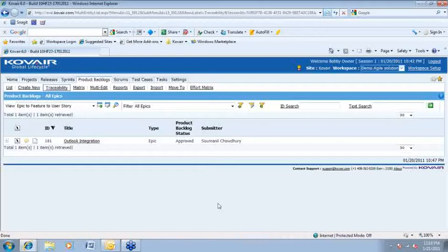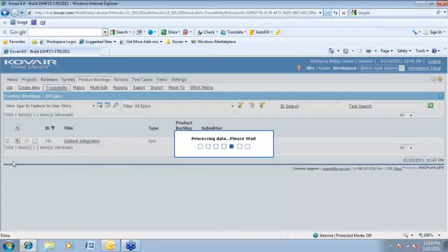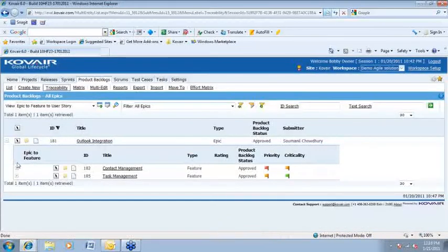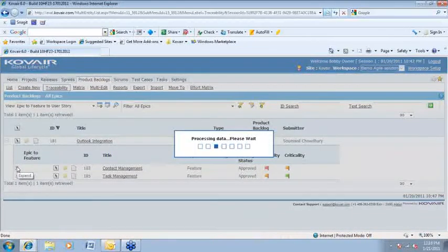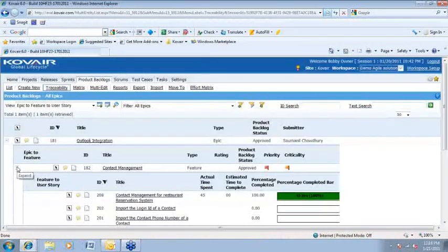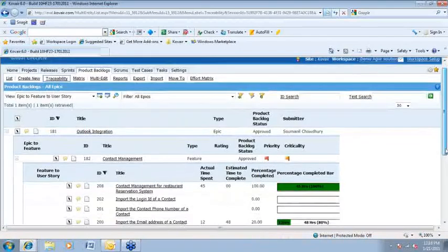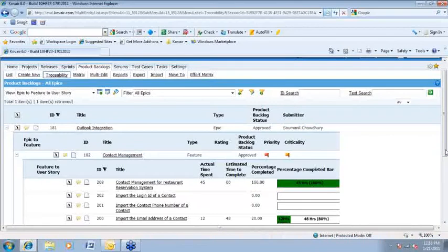At the top, we have kept epics. The epics are the customer specifications that are received at a very high level. Now, the epics are broken down into smaller features, and further, a feature is broken down into smaller user stories. Then these user stories are evaluated, they are estimated, assigned to sprints, and eventually get worked on.